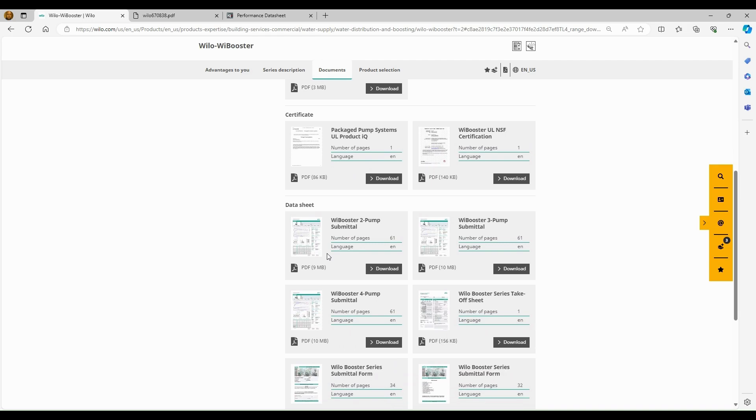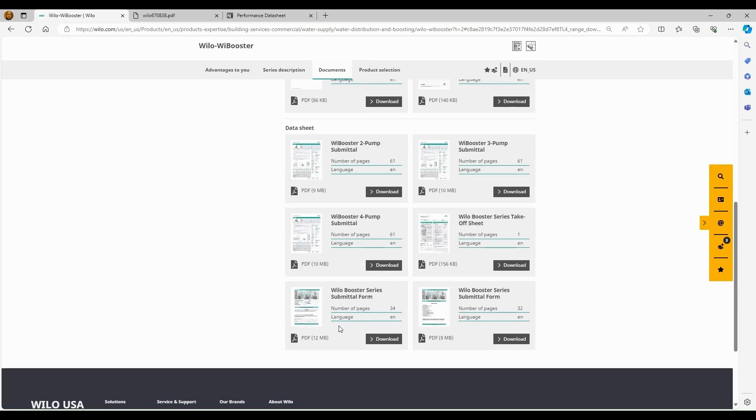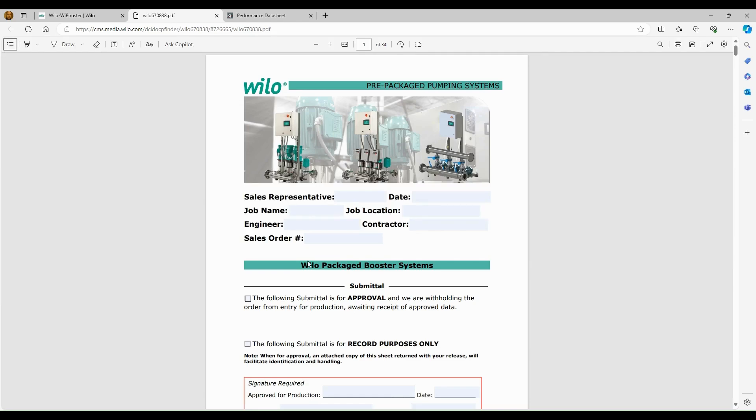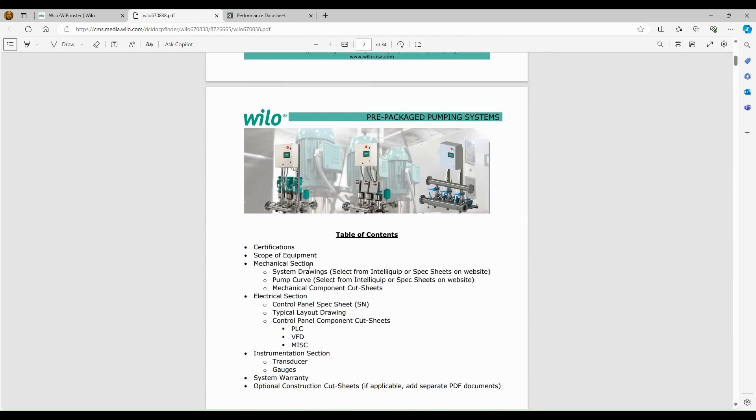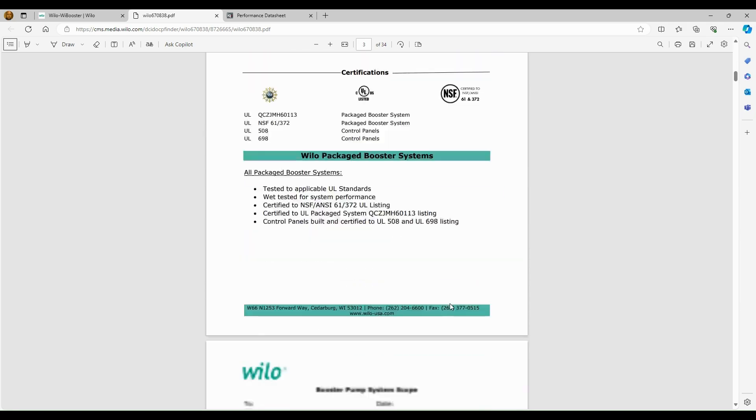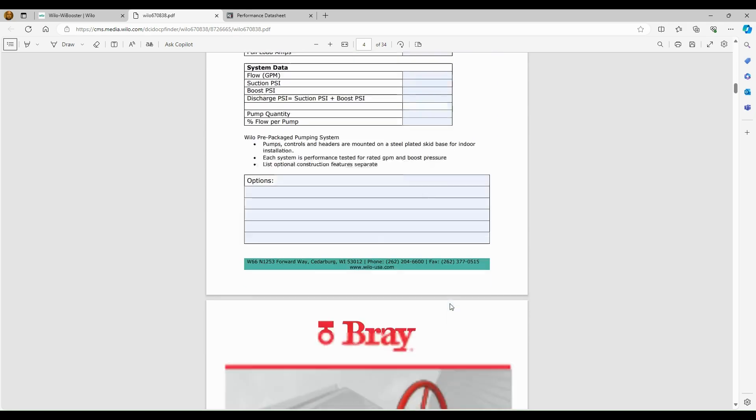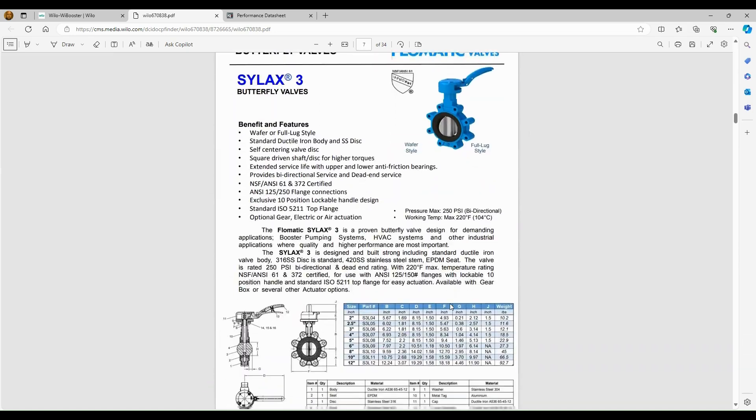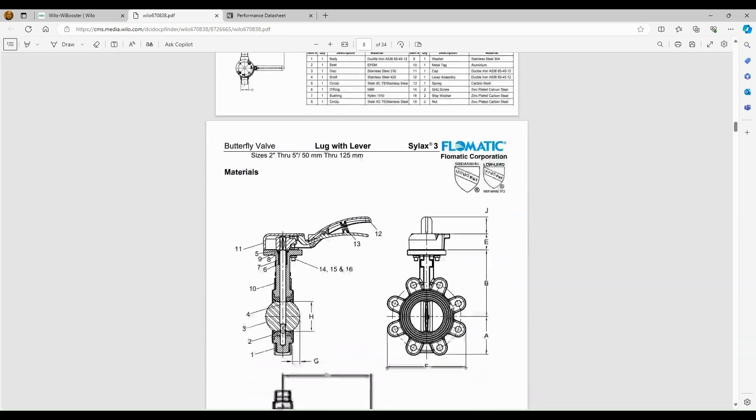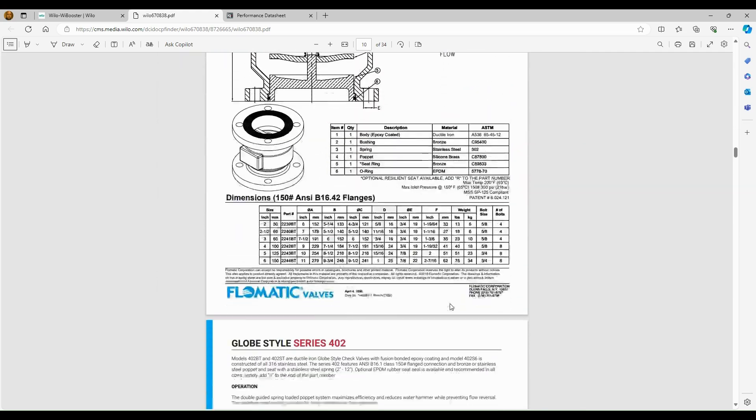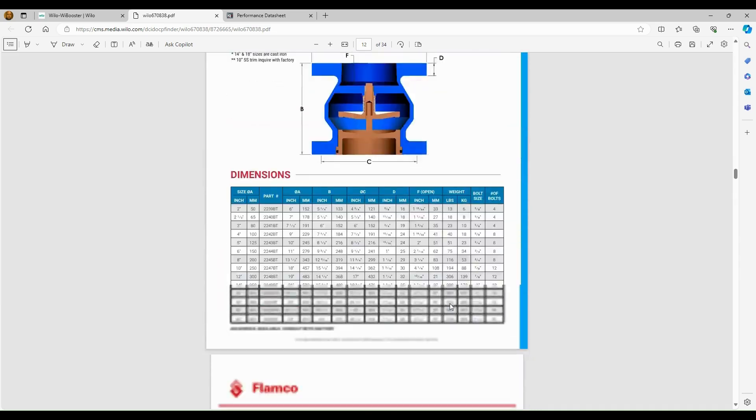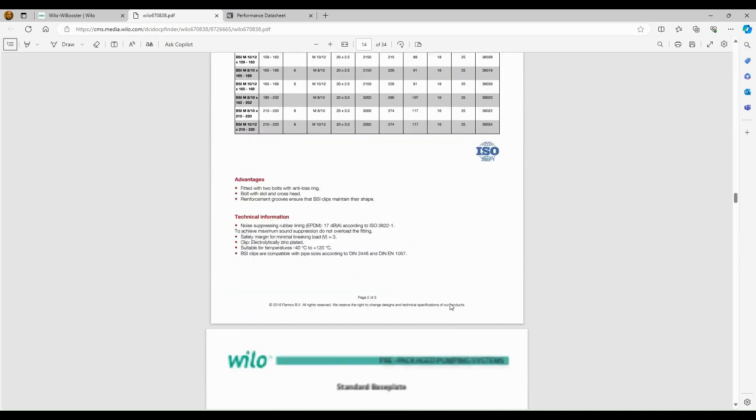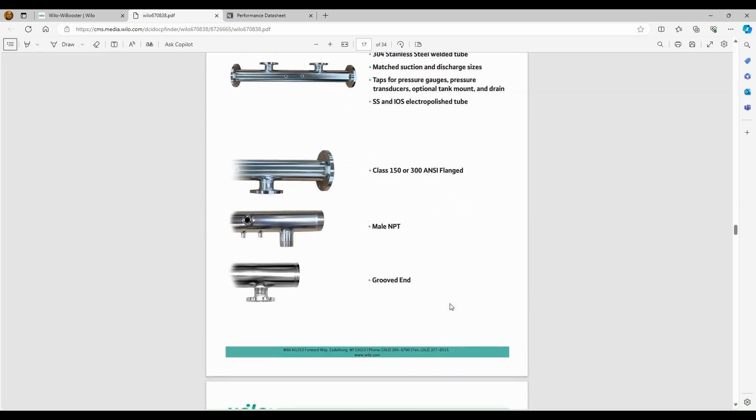Then farther down, we have our submittal documents that were also located in the software. We have our takeoff sheet, which I reviewed. And then we do have some additional booster submittal forms for more in-depth submittals. So this is what that document will look like. And as we go through the table of contents, we have certifications, the scope of the equipment. We have a mechanical section, an electrical section that covers the control panel, the PLCs, the VFDs, and then all the instrumentation and cut sheets that are going to go on these boosters. So we'll just kind of scroll through here. So this will need to be marked up per project because it is a general submittal. So we can work with applications engineering on the Wilo side and we'll help you go through this for any in-depth projects where you're going to need a submittal with all this detail.